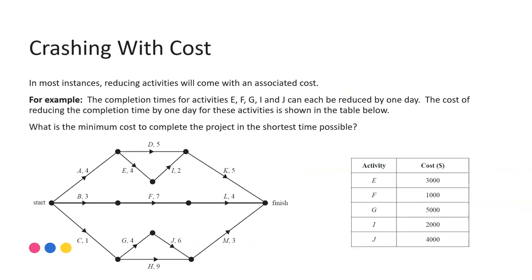Crashing with cost is where this notion of only reducing what's absolutely required comes heavily into play. So this example, I have a project network here and the completion times for activities E, F, G, I and J can all be reduced by one day. The cost of reducing the completion time by one day for these activities is shown in the table below. The reason why reductions might have a cost associated is usually in order to get that particular activity or job done within the project, there needs to be expenditure. Maybe more workers are brought in so that it can be completed faster or maybe more expensive resources. So it is usually about trying to save money or spend the minimum amount required in order to achieve the greatest saving overall.